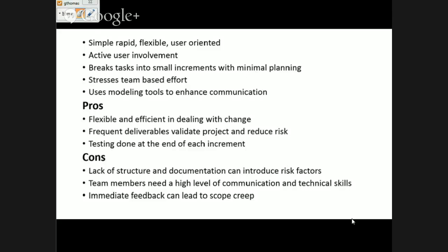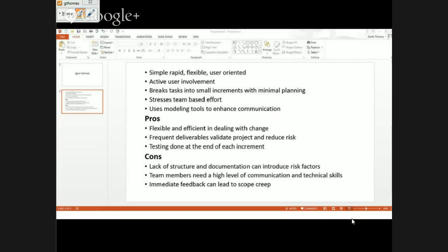Some of the pros of it are that it's flexible. It can change easily if you want to make any changes to it. And on the other side of that, also a con of that is it leads to scope creep. If you're testing after each step, then people are going to want to add things, or if they start testing it out. And then it has a lack of structure because they don't focus too much on the documentation of it, and it's focused more on the development of it and to keep the project moving forward to try and get it done as quickly as possible.